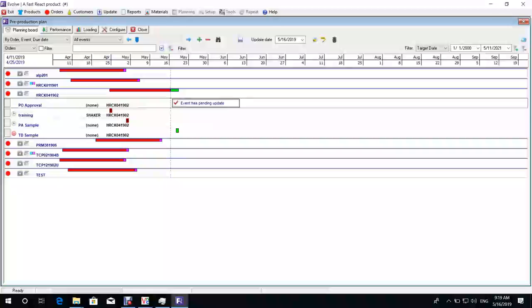and then see which events we're doing on time, which we're doing late, and how these all affect our actual production and when we can actually go ahead with production. Because if we don't have all of these activities complete before production starts, then the site can't actually go ahead and begin sewing. Okay, so all this area is pretty key to actual chasing up and ensuring all our activities are done on time.